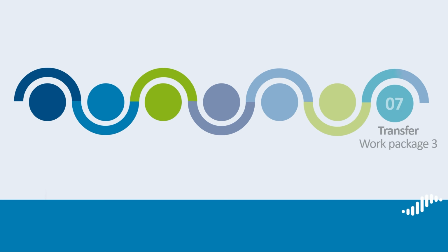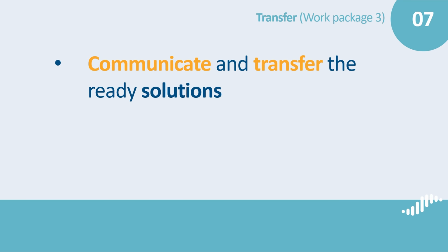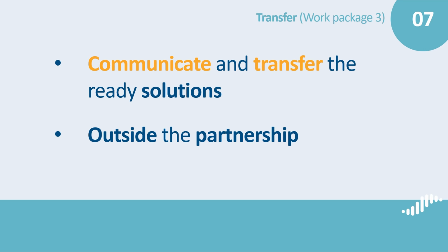Work Package 3, Transferring Solutions. In this work package, you will communicate and transfer the ready solutions to your target groups also outside the partnership. We recommend to plan at least 1 year for this work package.